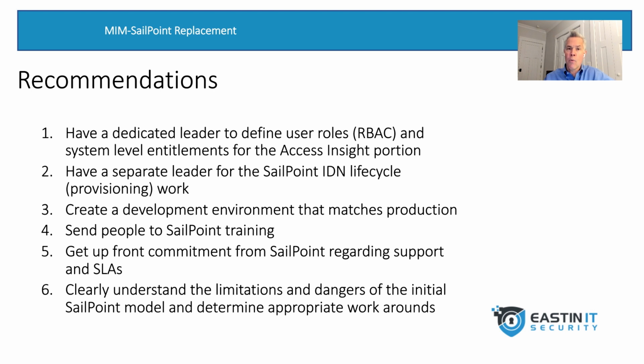Next recommendation, and this is really more for the executives on the call, is you're going to want to get upfront commitment from SailPoint regarding their support model, SLAs, escalation paths, all of those types of things, because again, we just did not have the best experience with the level 1 folks at SailPoint, and there were a lot of escalations, and I'll leave it to your imagination what those escalations entailed, but we really had to pull out the stops to get help. So again, for the executives and managers on the call, key point: talk to your SailPoint rep, talk to your customer success rep over at SailPoint, and make sure that you know exactly, if you have a problem, what that escalation path looks like. Don't wait to do this.